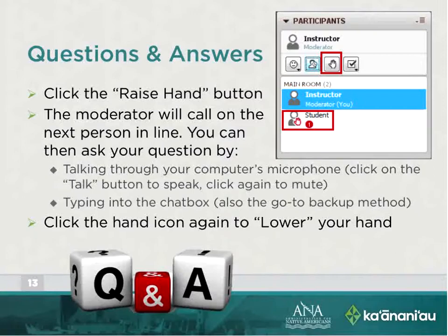The OWP is a tool that ANA uses. It would certainly change to reflect the activities to be performed and completed in the extended period. So I'm not sure if ANA would want you to amend the current OWP or submit a new one, but in the no-cost extension request instruction in Grant Solutions, it will ask you to submit a timeline as to how you think that you will complete each activity and when. So that would be in addition to the OWP. But from a grants management perspective, we look at the timeline to see when you propose to complete these things.